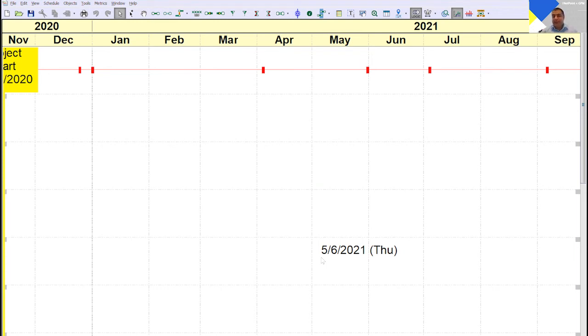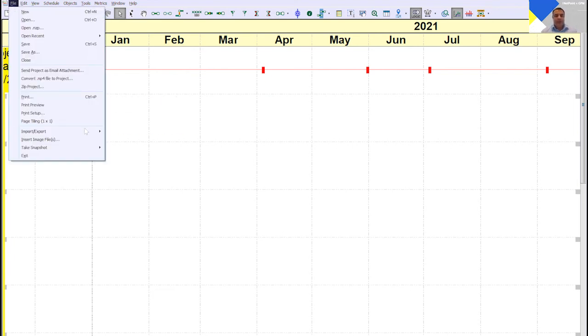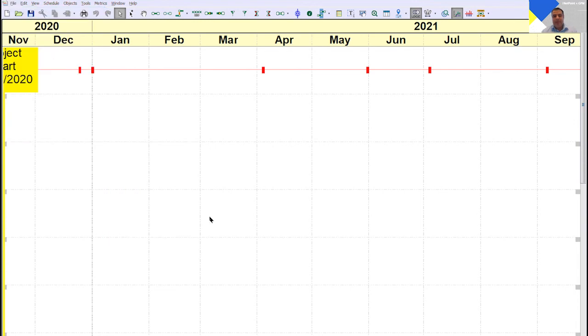But importing from Excel, you can give different Excel sheets to different trades and have them put down their activities. Let's say you were doing a collaborative session and there were 3 groups that you wanted to see how their activities will work together. You can give an Excel file, ask them for an Excel list of their activities with a name, when the expected start is, expected duration is, something of that sort, if they have any relationships and things like that. And you can bring in all of those into one file. So over here, I will go into import from Excel.